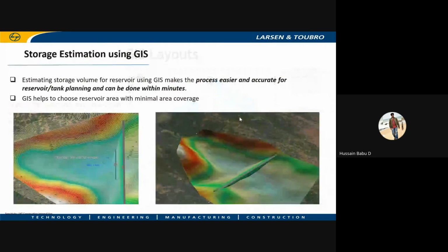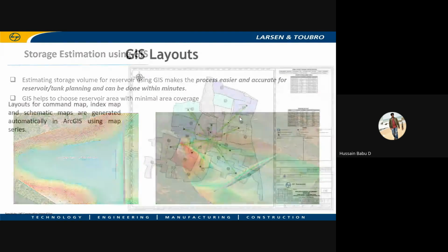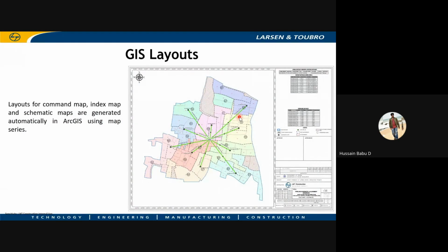So this entire process has reduced our project timeline effectively. The projects which took some 1 year for engineering purposes, we are now doing in 6 months, and what took some 3 years of engineering time, we are doing in 1.5 years now. In the last 5 years, we have achieved this kind of digitalization in engineering, which is drastically reducing manpower, and also the use of engineering manpower just for drafting and planning purposes. They can focus more on hydraulic designs from an engineering perspective than on this kind of drafting and planning.